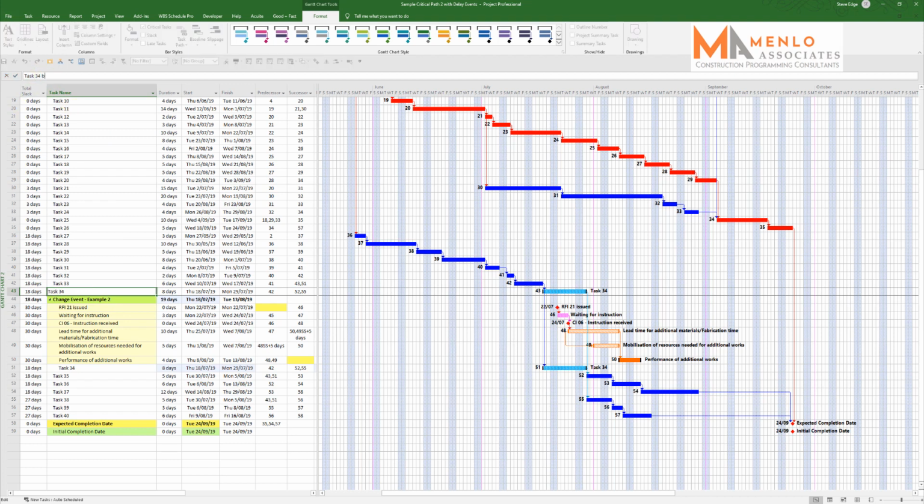So if I call this one before the problem, and this will be task 34, balance of work after the fix. I'm just doing this so that it makes it explicit about how it's going on. Now you notice that because they're copies of it, they carry the same links. So these are both affecting the program in exactly the same way at this point in time.